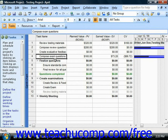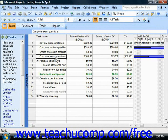Just as with the other view, you'll see the planned value, or PV, and the earned value, or EV, columns. Also within this view you will find the CV column, which is Cost Variance — that's the difference between the EV and the actual cost of work performed as of the status date.